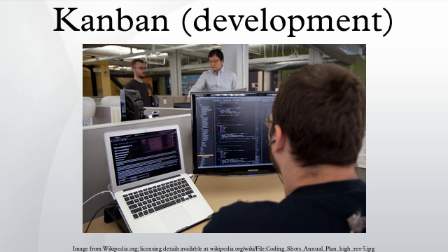Kanban method's 6 core practices. Anderson identified 5 core properties that had been observed in each successful implementation of the Kanban method. They were later relabeled as practices and extended with the addition of a 6th. Visualize. Visualizing workflows supports proper understanding of changes planned and helps to implement them according to this plan. A common way to visualize the workflow is to use a card wall with cards and columns. The columns on the card wall represent different states or steps in the workflow.